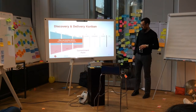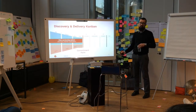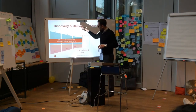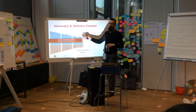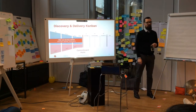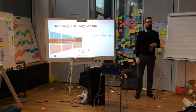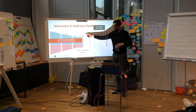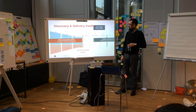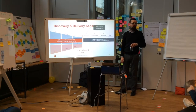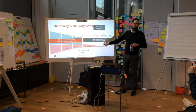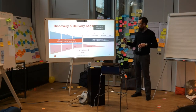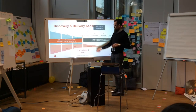Markets are uncertain, the environment is uncertain. You need to take time with your ideas. You do some elaboration, approvals potentially, and then something is ready. In that stage of the process, it's totally okay to discard a lot of things. However, if work arrives at the commitment point and you have the buffer as in the A-B-C example, then you deliver committed work. What you don't want is work arriving in your delivery process and having a high discard or avoid rate in delivery.